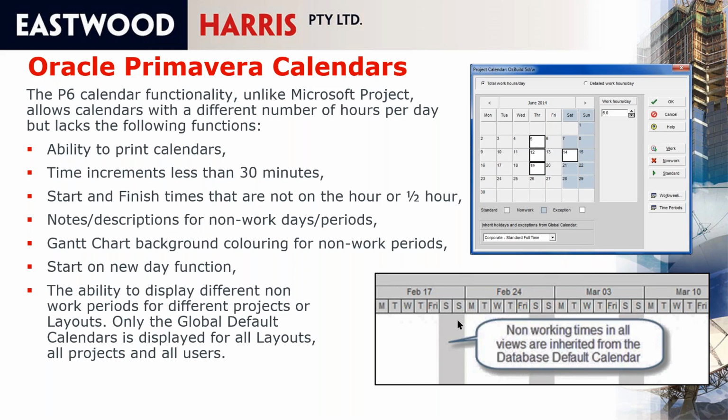And I've been working on a project where the customer is really keen to see they were working 10 days with 1 day off and then 4 days and 7 days off, and the customer wanted to see that non-working time in the background. The only way we could provide that is by creating a new database, because the other projects in that company didn't want to show that different non-work time in the background.